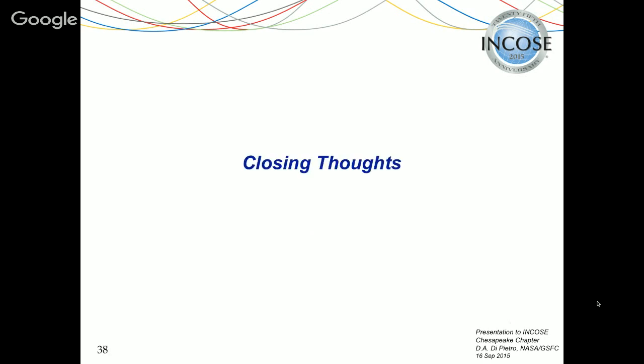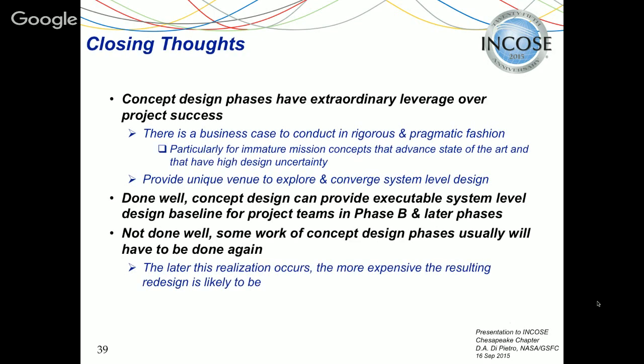Okay, closing thoughts. Concept design phases have extraordinary leverage over project success. There's a business case to conduct them in a rigorous and pragmatic fashion, particularly for these kinds of first-of-a-kind, cutting-edge technology missions. They provide a unique venue to explore and converge system-level design. Done well, concept design can provide an executable system-level baseline for phase B and later phases. Not done well, some of the work of the concept design phases will have to be done again. And the later that realization occurs, the more expensive the resulting redesign is likely to be.